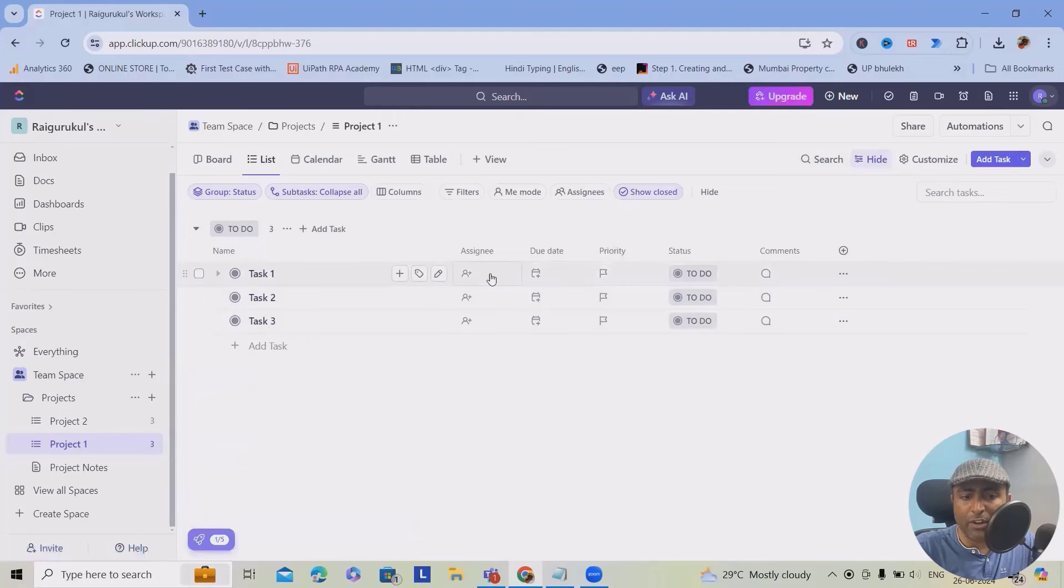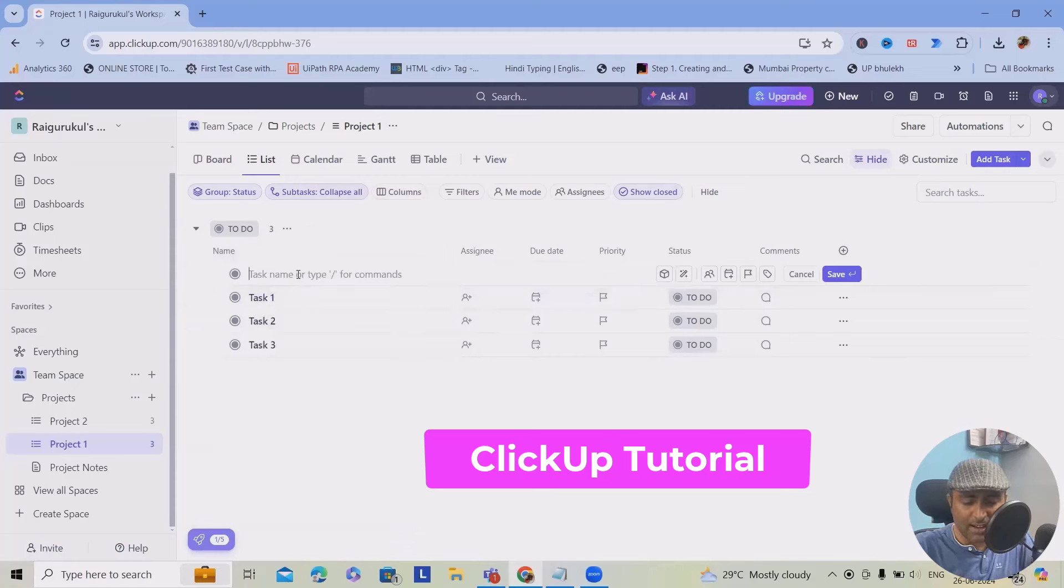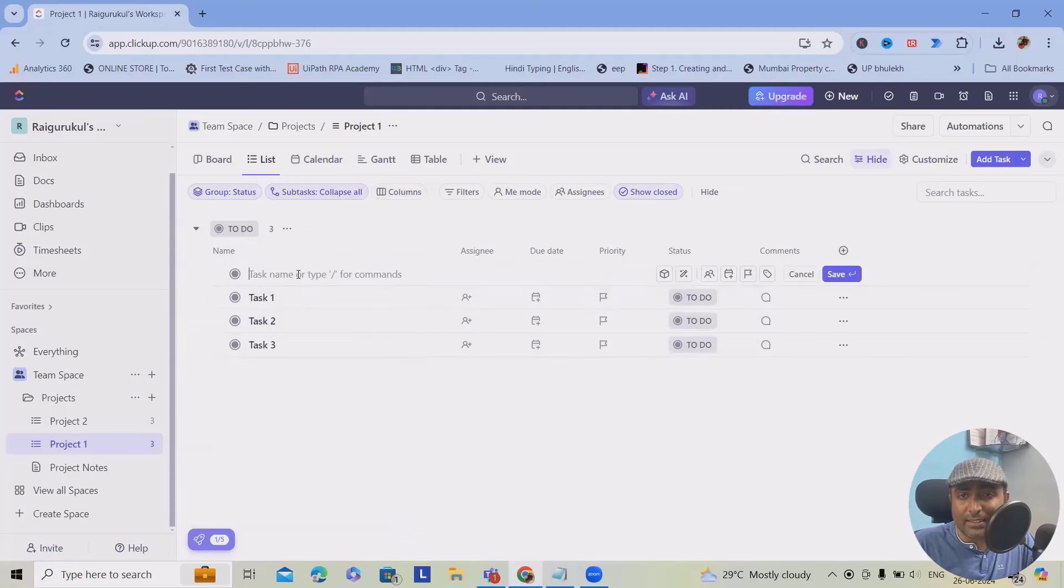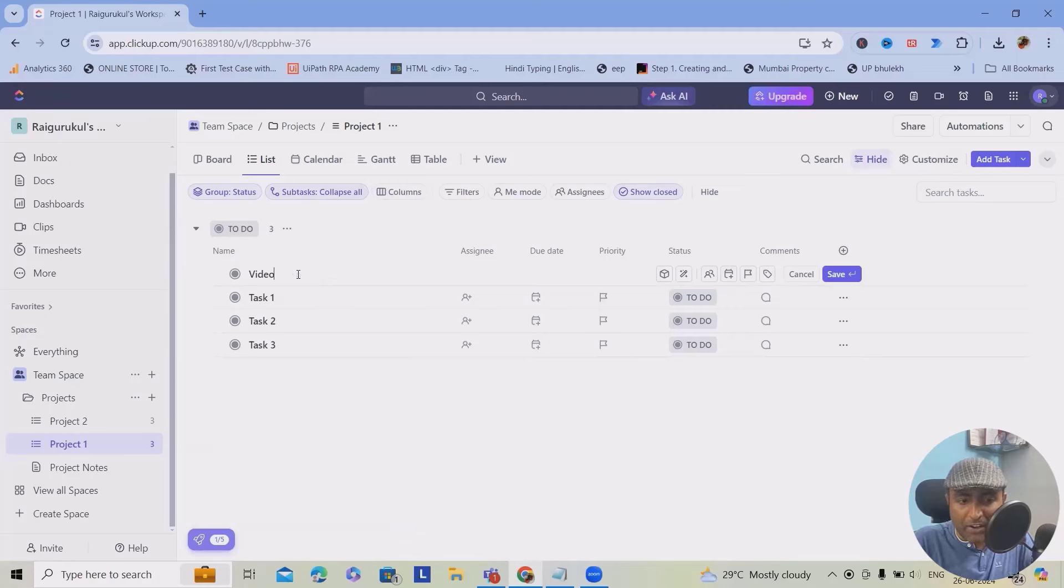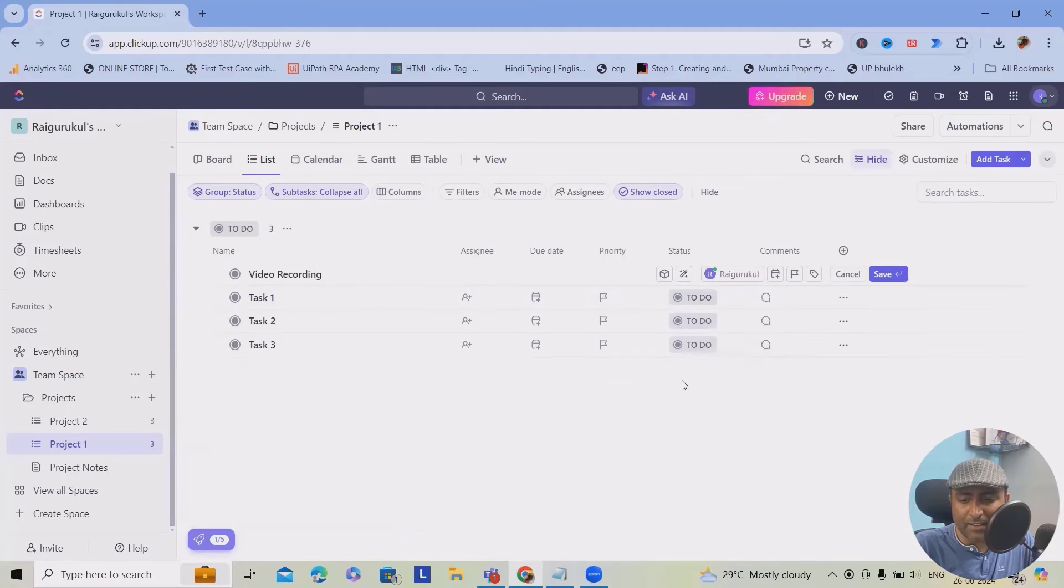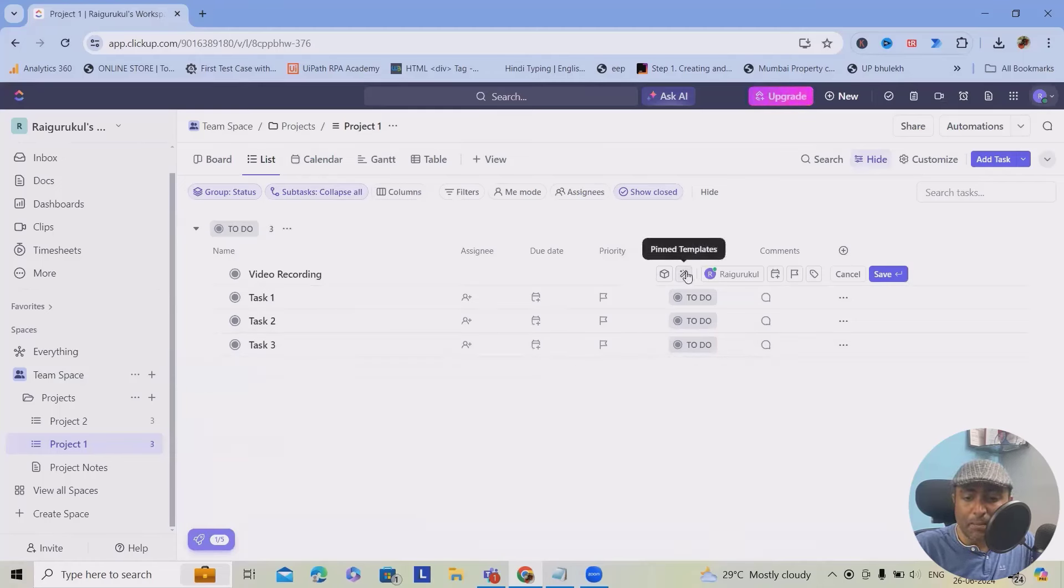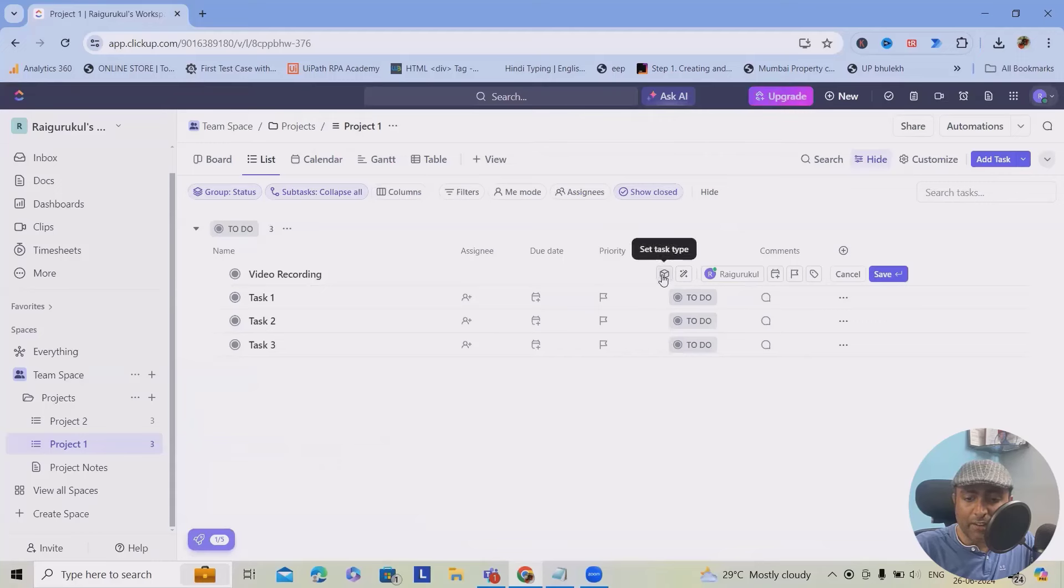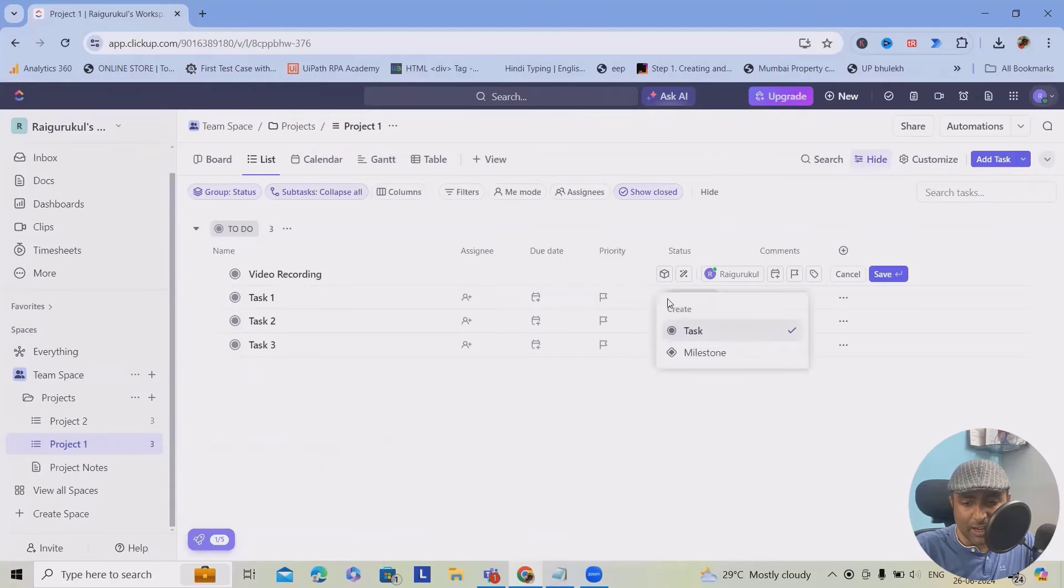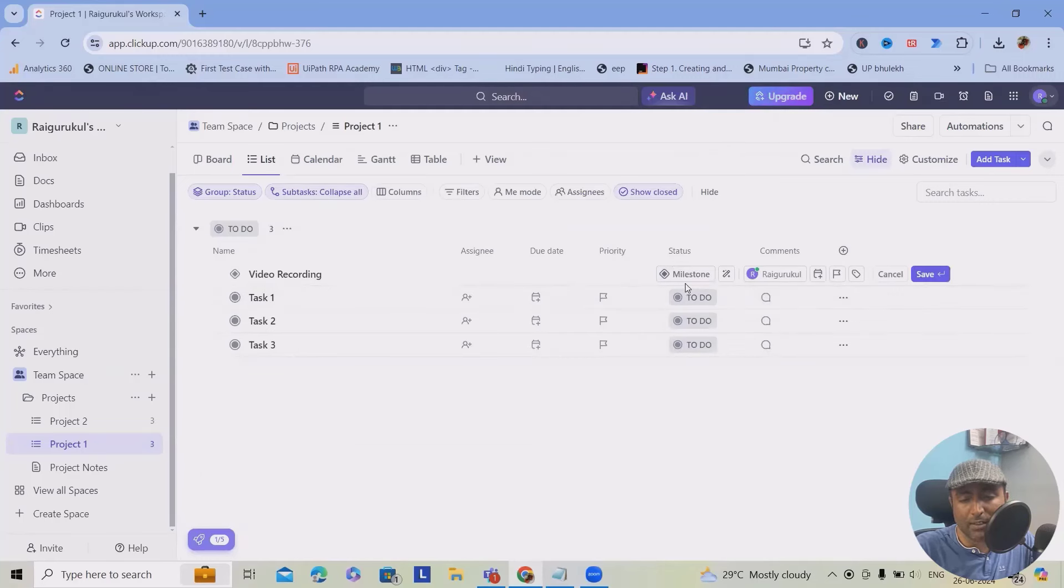Whenever you want, you can add more number of tasks by clicking add task, provide the task name. Let's consider I'm providing the task name as video recording. Here, if you want, you can add the username or add the person name or assignee. As of now, in my instance or workspace, I'm just one user. Here, we can pin the templates. We can also set task type. If you want to use it for milestone, we'll select milestone, else we can keep it task. But if you want, you can customize this type as well.